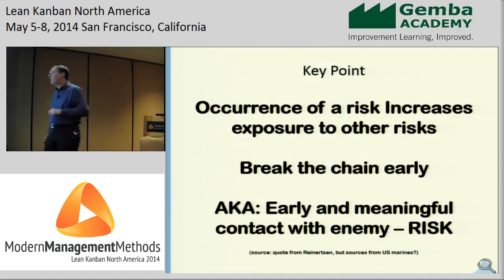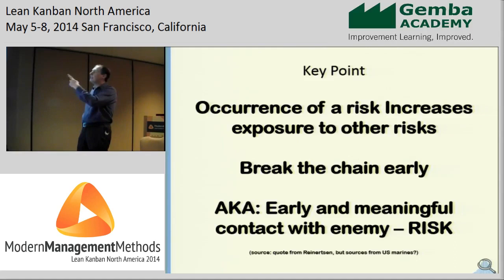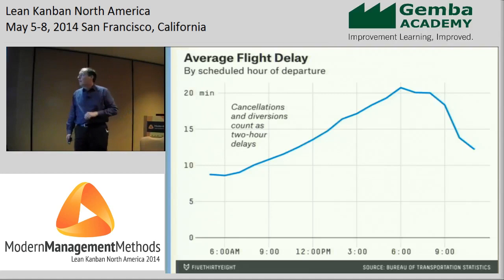Risk causes more risk to occur — an occurrence of risk is a leading indicator that you're going to have more risks in the future. You must break the chain early. This is known in military parlance: you need to make early contact with the enemy. Only by putting a system under stress early do you start finding out what risks you need to solve, and the earlier you do that, the earlier you start breaking the chains in that regenerative process of failure demand.